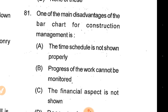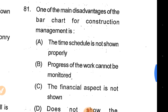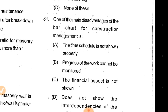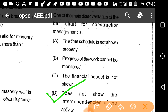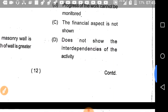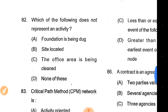Question 81: One of the main disadvantages of the bar chart for construction management is option D — it does not show the interdependence of activities.